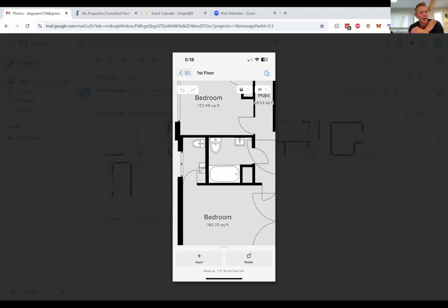And you're not doing a lot of frame wall work, so I don't think you're moving a lot of stuff around. You could almost just get away with plumbing and electrical permits, I think. Yeah, this is the only thing I'm moving, if I am moving anything. Everything else is pretty clean. I don't even think they notice in the field. Honestly, if it was me, I'd pull electrical and plumbing only. Sweet. Thanks, James. And those are over the counter, so it seems better.